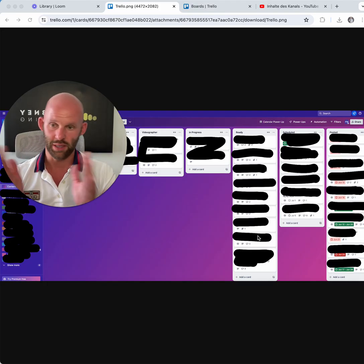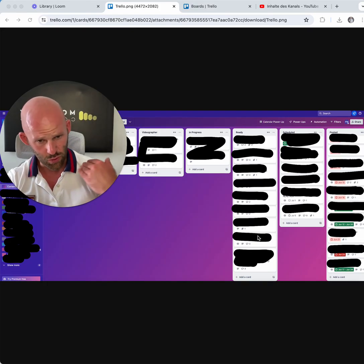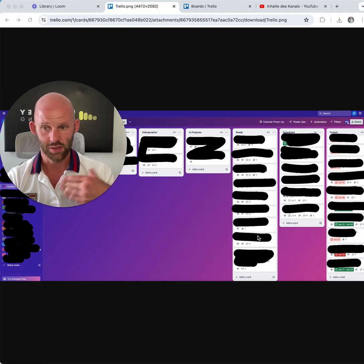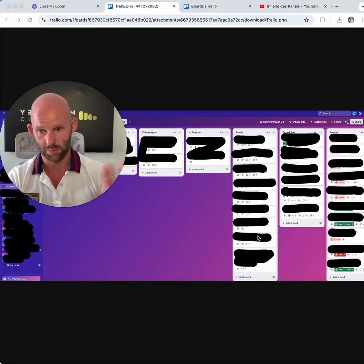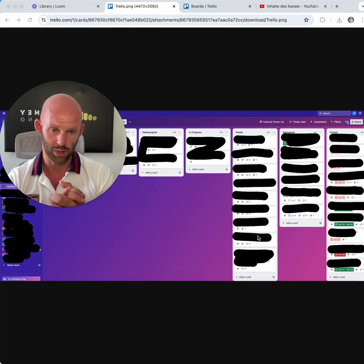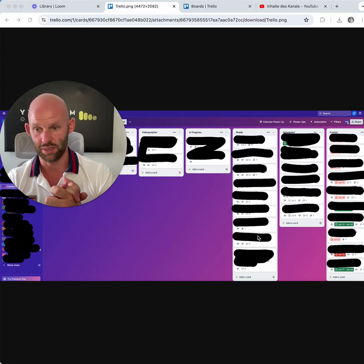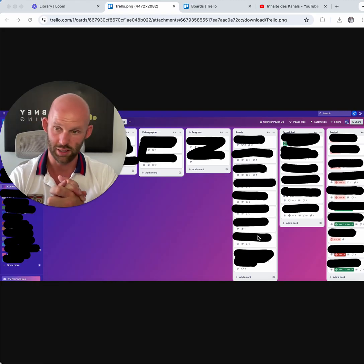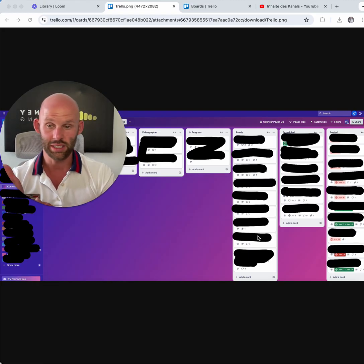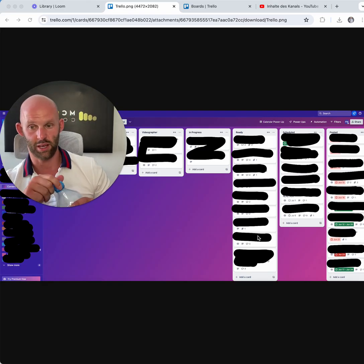Trello can be used simply as a project management board. You can create a Trello board for each project or client. You can add lists to represent project stages — To Do, In Progress, Completed — basically a Kanban or Scrum board. You can create cards for specific tasks, issues, and milestones within each list.